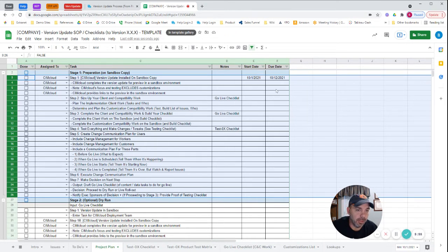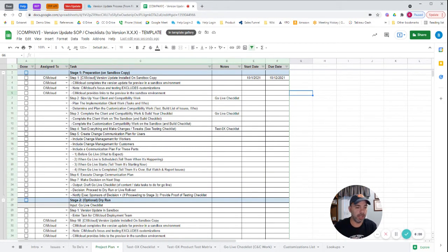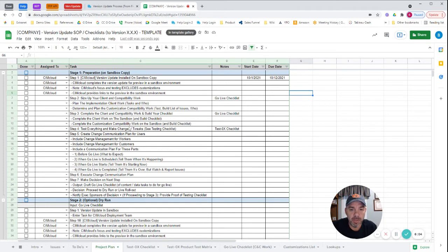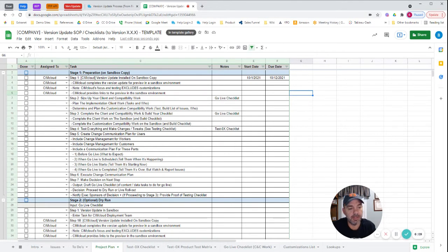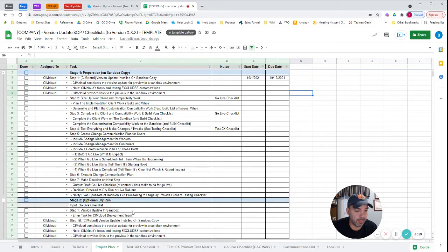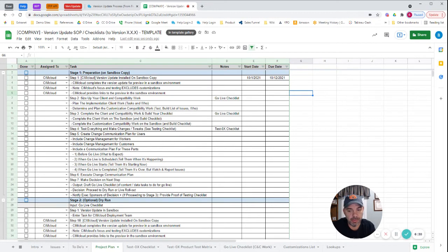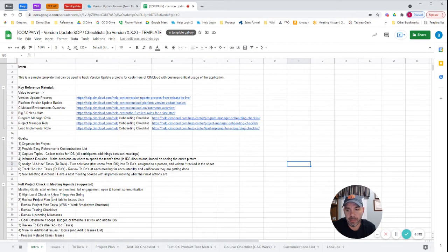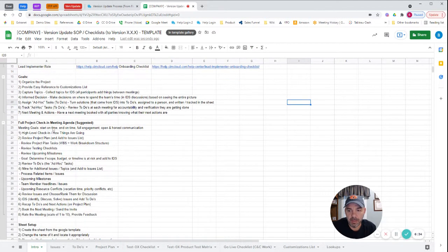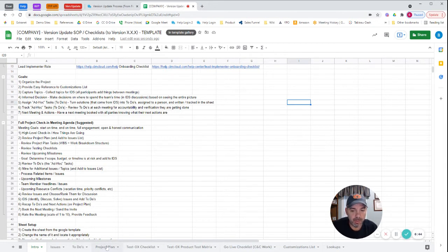You can use start and due dates if you want. You can get elaborate. You don't have to use this tracking sheet. If you're into Gantt charts and other project tracking documents, feel free to use that. But the concept here is you need to have a plan that you're following that's going to give you a high chance of success for the outcome. And then you need to have a way to track and address issues and track other ad hoc to-dos that come up. There's also an article in the Help Center on booking your next project meeting and using a meeting-to-meeting cadence where you're basically using an agenda that's recommended here on your meetings. You need to basically mine for issues, decide what's important to discuss, discuss them, and turn those into to-dos that are getting done. You're also validating the to-dos every meeting and the project plan to make sure things are on track.